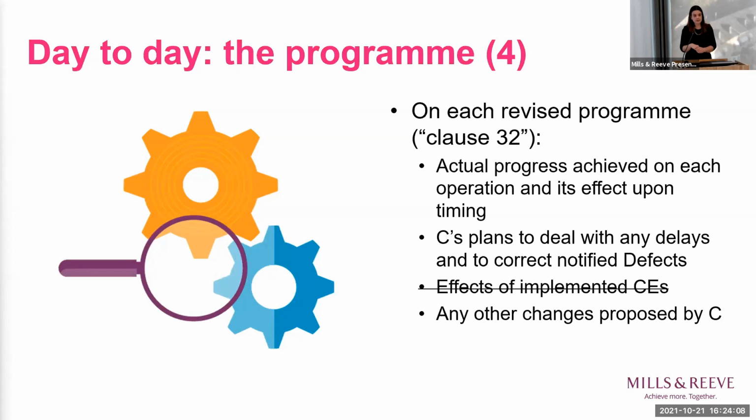And the reason for this is because whether something's a compensation event or not isn't actually relevant to whether it happened or not. So the purpose of the programme becomes showing what has happened and what is going to happen, rather than becoming a tool to discuss liability. And that change has been made based on feedback, because this was a problem in terms of parties managing to keep agreement of programmes going forwards.